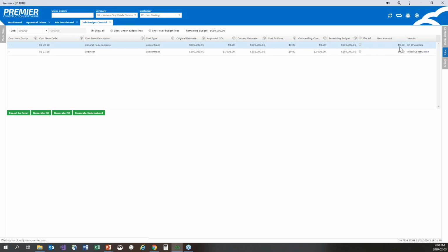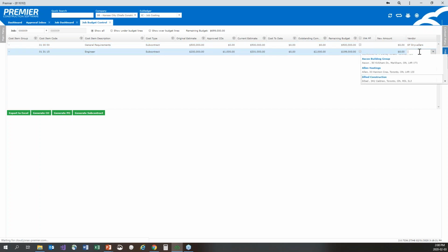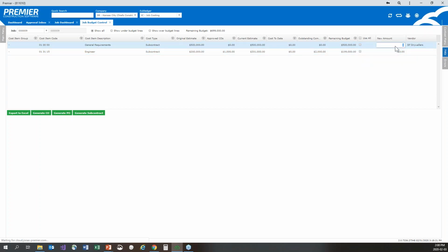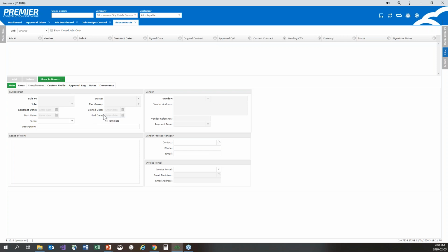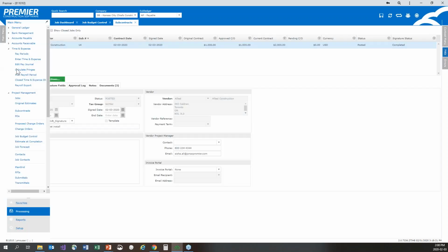Okay, so what I'm going to do is I'm going to say, you know what, I need to issue a subcontract to the San Francisco drywallers, and I'm going to issue that for $5,000. I'm going to hit generate subcontract, and the system is going to kick open that subcontract screen. It's going to pre-fill everything for me in terms of my cost items, in terms of the amount, because I just put it in.